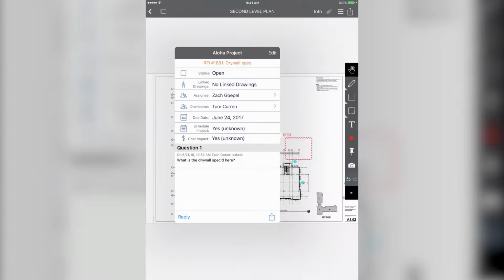That gives us the instant ability when forecasting to view everything that's been accumulated over the day, the week, or the month. So instead of waiting in the old school way of forecasting on the 27th of the month, you can actually have a rolling real-time forecast based on the knowledge and intelligence of your entire field team. Very important function.